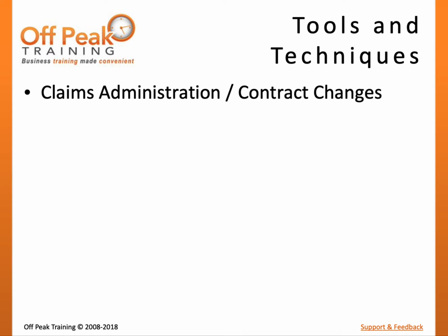When buyer and seller feel that the agreement has not been properly followed by the other party and disputes arise, claims administration is a technique to resolve such disputes or conflicts between the buyer and seller. This process should be defined in the contract, potentially including negotiation or arbitration. If a settlement cannot be reached, litigation may be necessary.